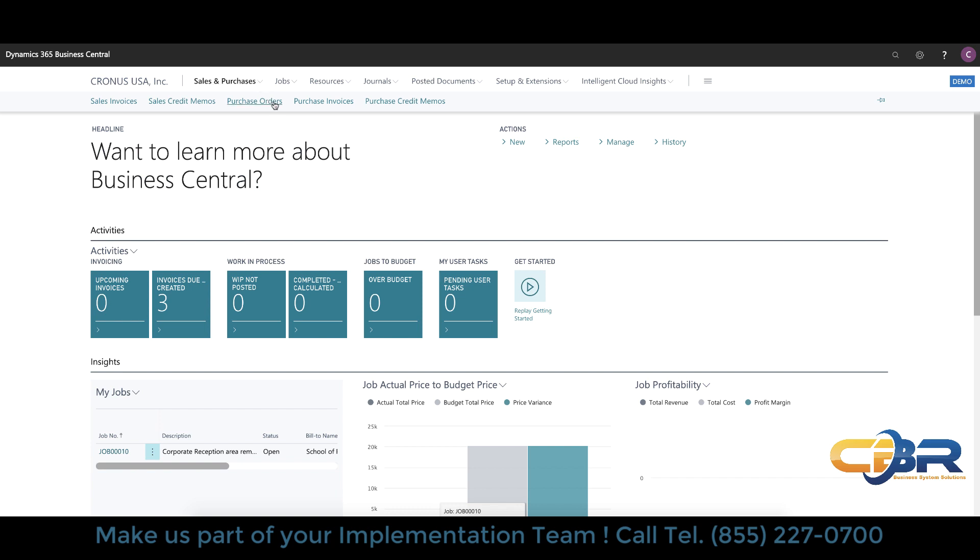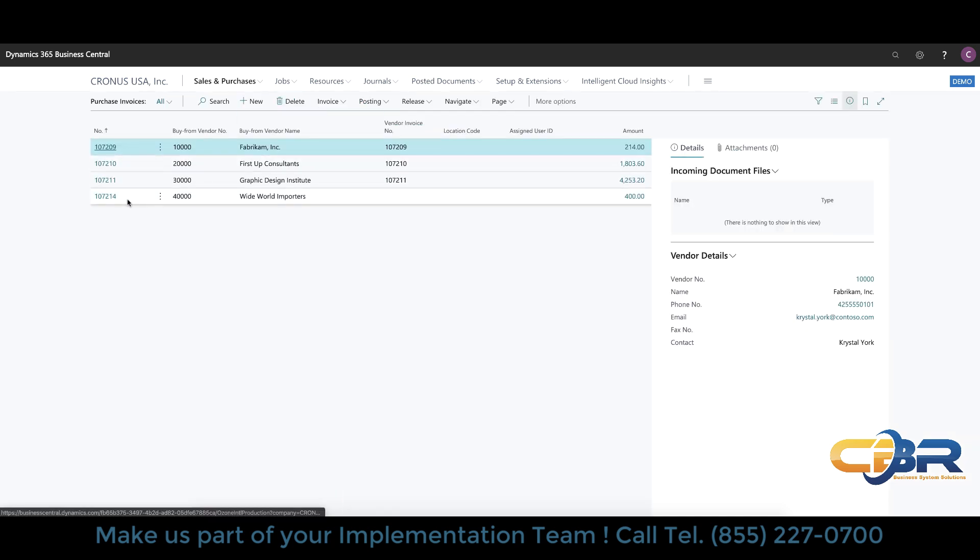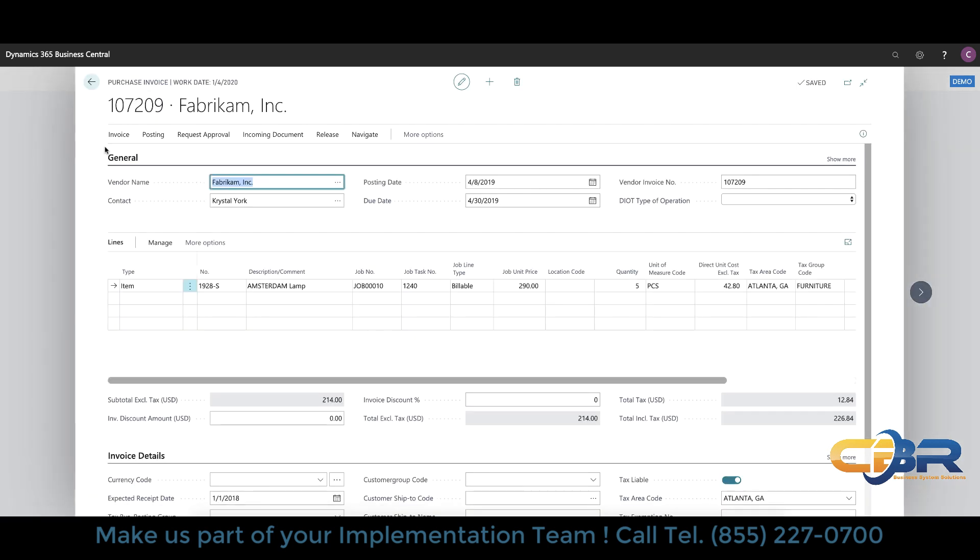Now with regards to the sales and purchase sub-ledger related activity you can do most things as a job manager from the sales and purchases pull down menu here. In my case I can either issue a purchase order or just record a purchase invoice for job related expenses and as you do them they would be quite clearly marked and related to specific job lines and job tasks. So obviously I'm not going to go through all the details here but if you look on the individual line you'll see that I have the ability to recognize a job and a job task number and whether or not it's billable or non-billable and a selling unit price for billing purposes of this particular part. So I'm purchasing something for a job either on an invoice or a purchase order that then goes through a three-way matching process. In the end though it will get billed out to the job or recorded as a cost for a job depending on what type of revenue recognition methodology you have deployed on the job side of the system. So this is quite powerful from both the purchase order as well as a purchase invoice perspective.